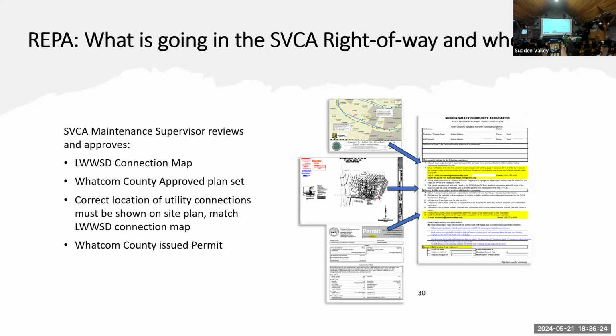So we take these things up, we attach them to the permit, and we send them to Mike for his approval. I do recommend maybe 2 weeks to schedule this meeting because it may take Mike some time to approve it. He may have questions. There might be some more information that needs to happen before he's ready to approve the REPA.